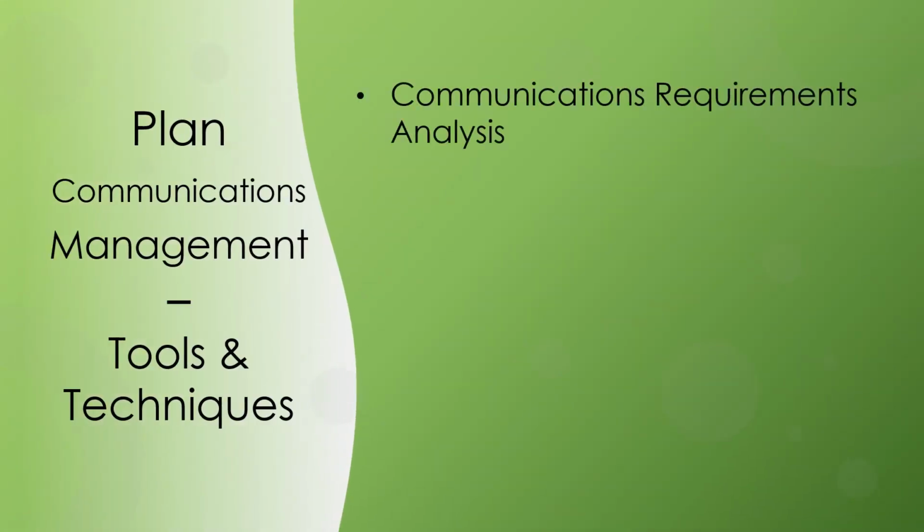Communication requirements analysis. An analysis of communication requirements determines the information needs of the project stakeholders. These requirements are defined by combining the type and format of information needed with an analysis of the value of that information. Sources of information typically used to identify and define project communication requirements include stakeholder information and communication requirements